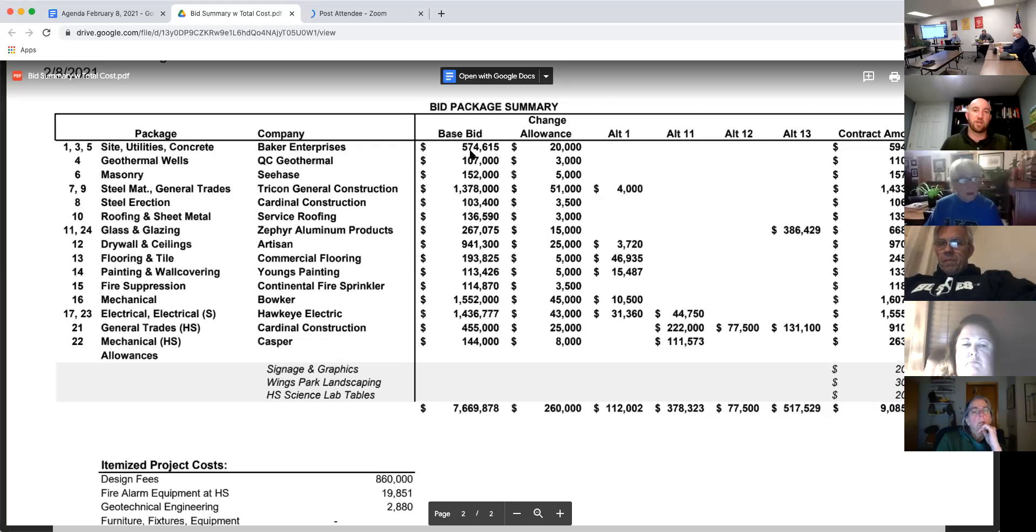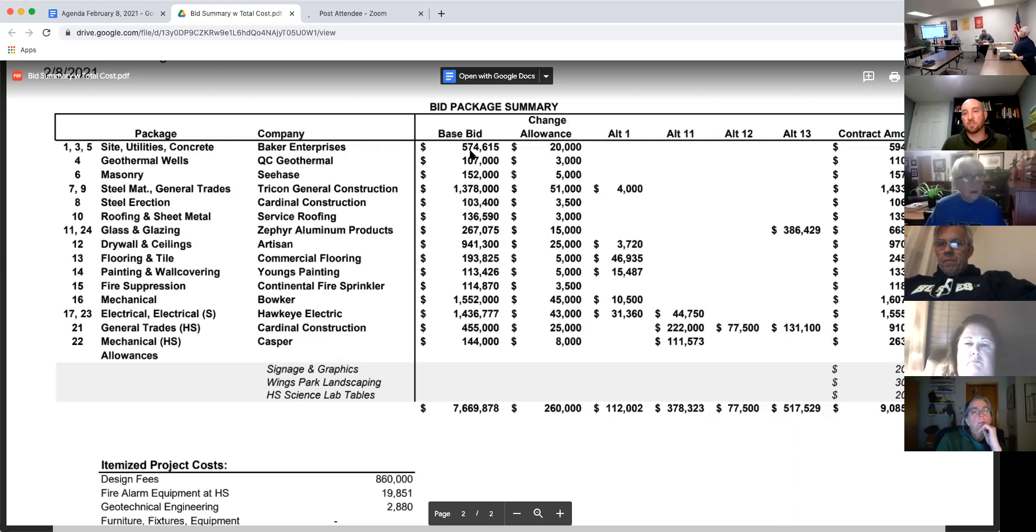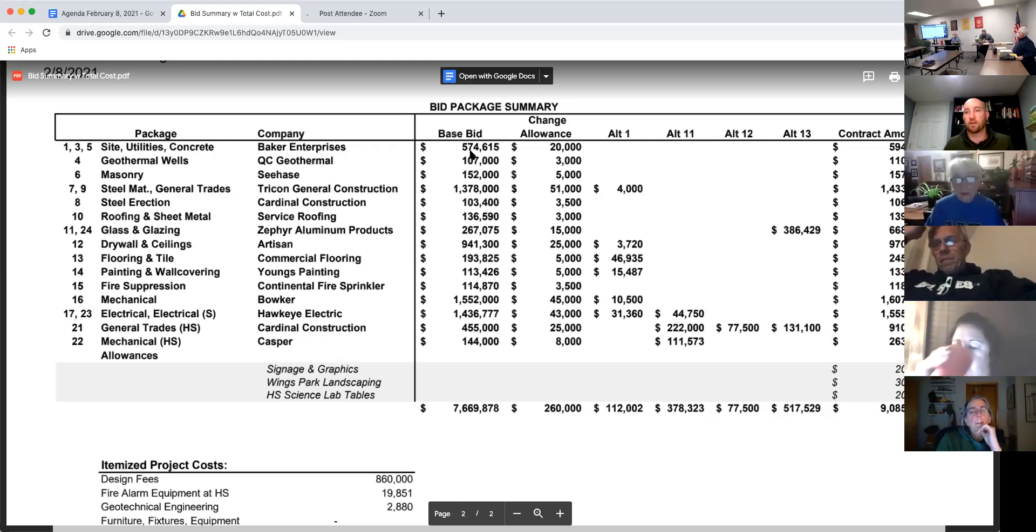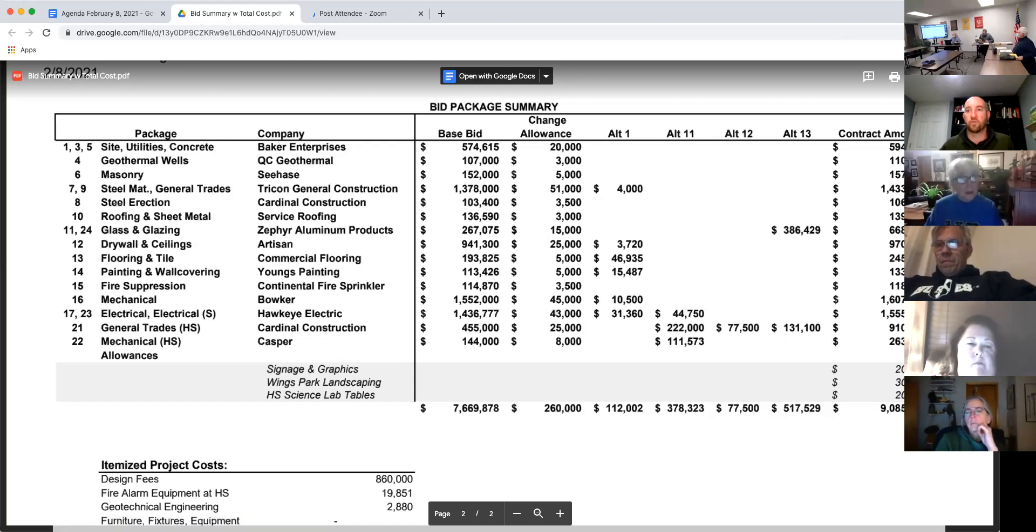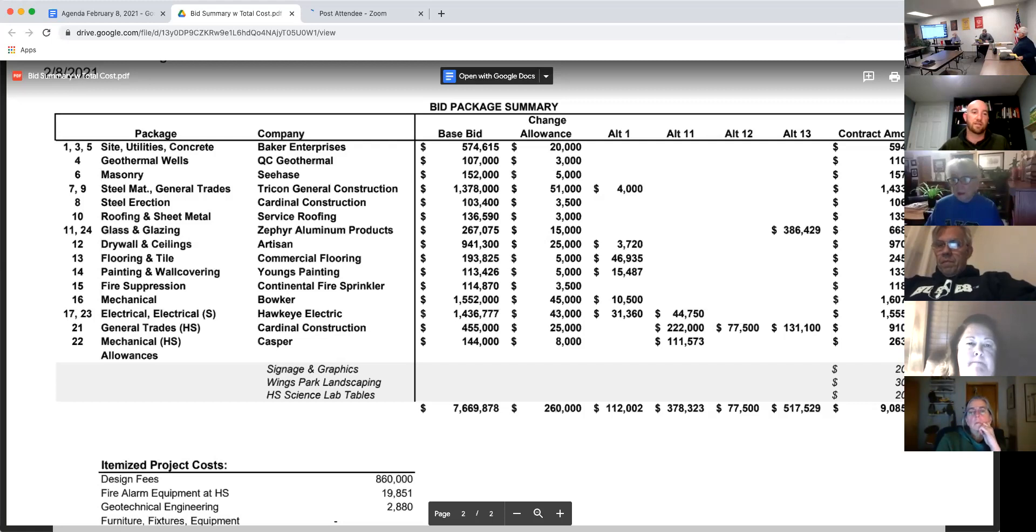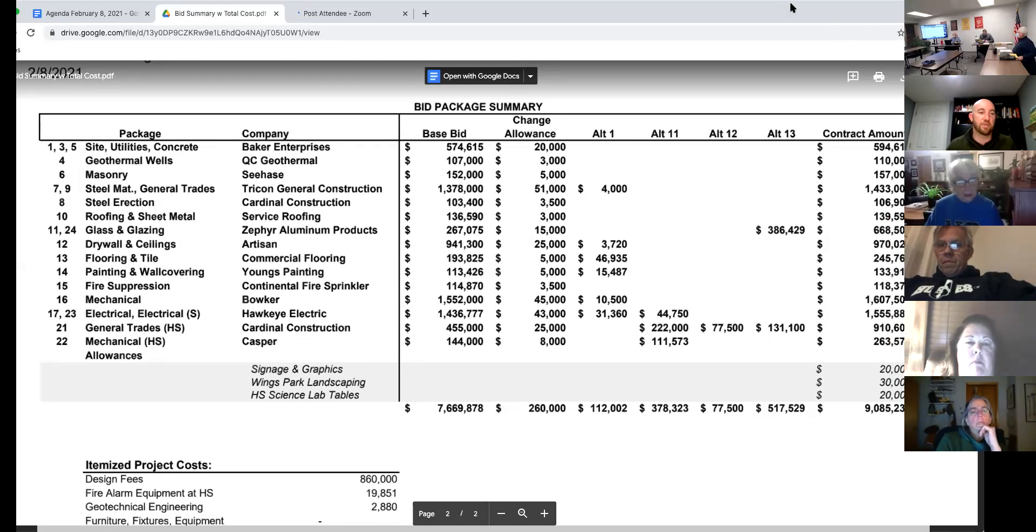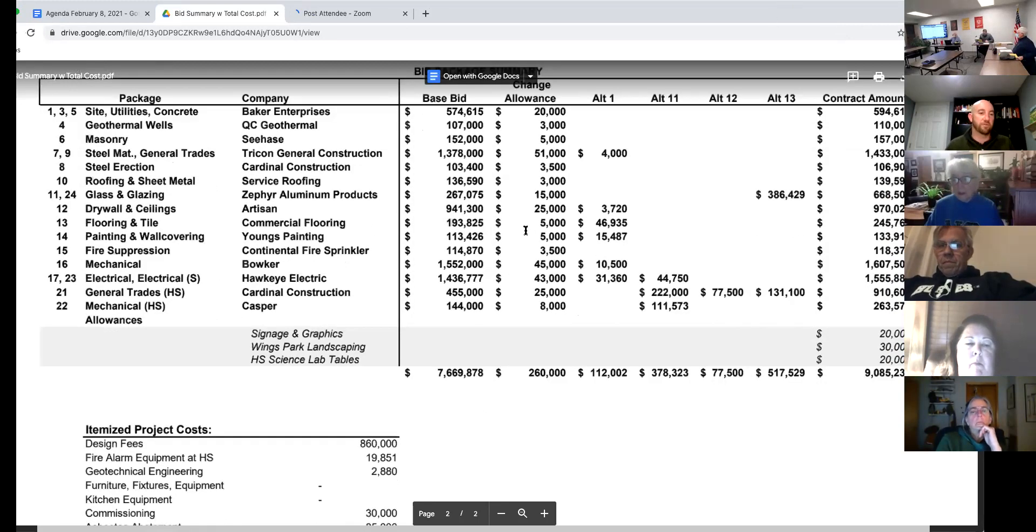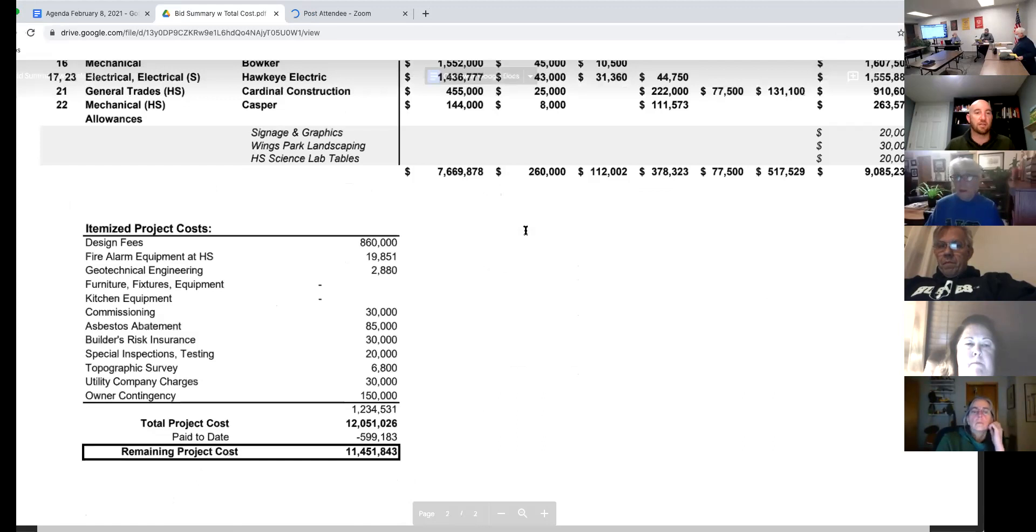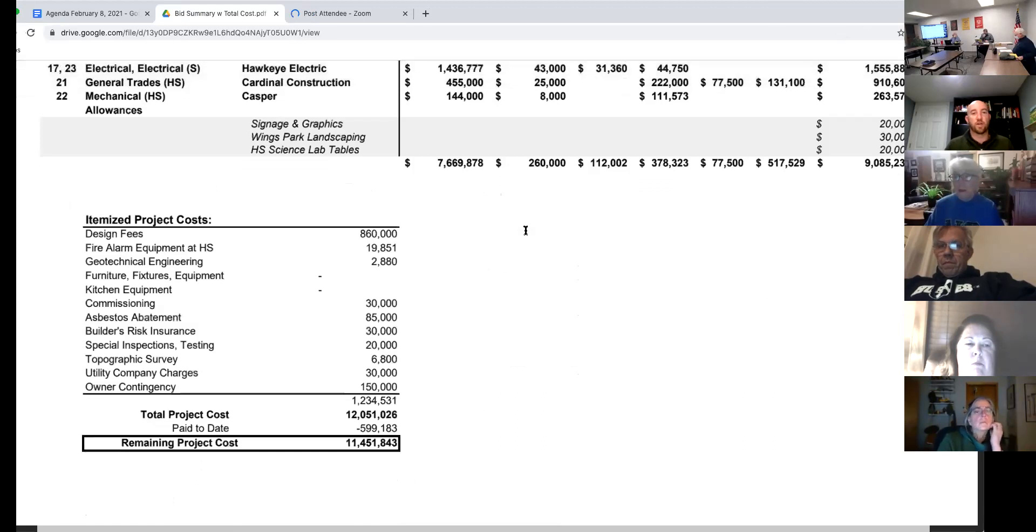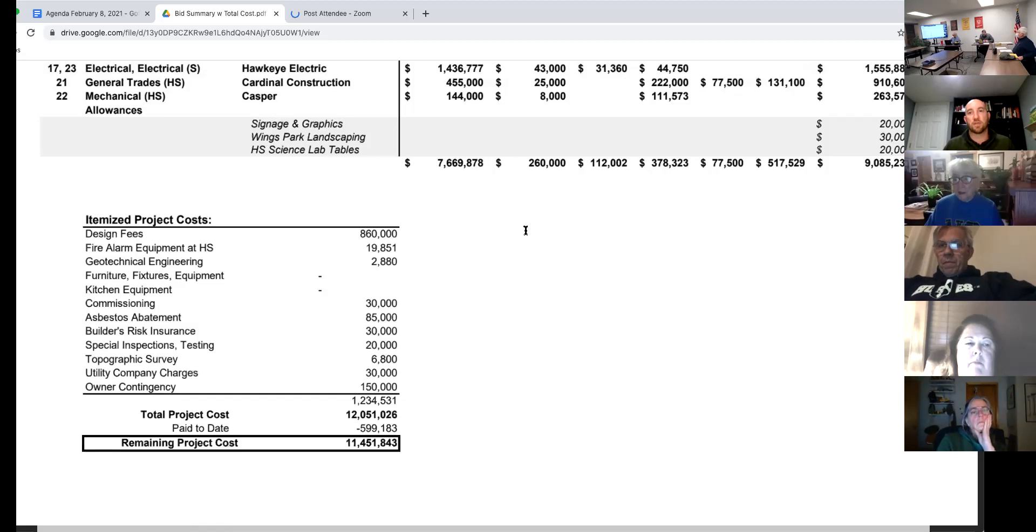I think the only common prime contractor is the electrician that will be doing both schools. So this summary showed their base bid, an amount for change allowance, and then any of the alternates. And to the far right would be their final contract amount. And then on the bottom of the sheet is just some of the other costs so you can see the full cost, not just construction.